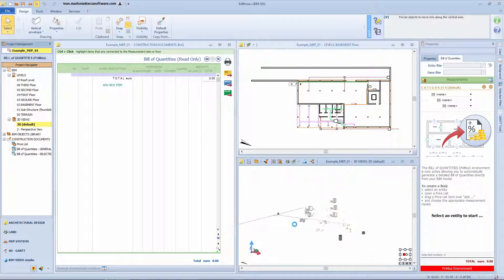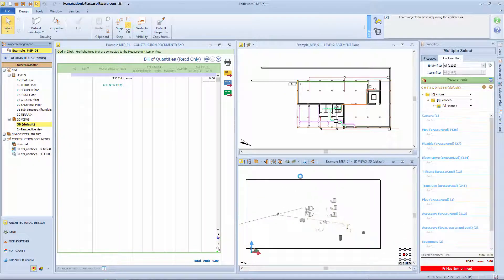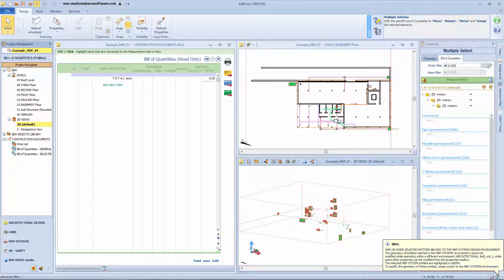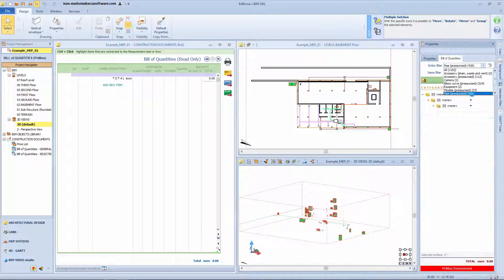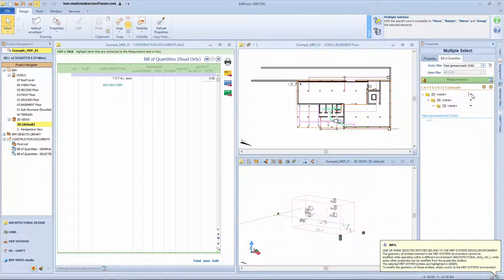With multiple selections, you can then use the Entity Filter to highlight a group of objects of the same type and proceed with the Quantity Takeoff procedure.